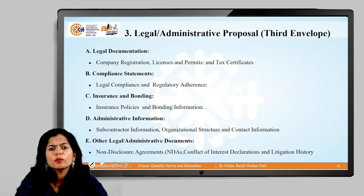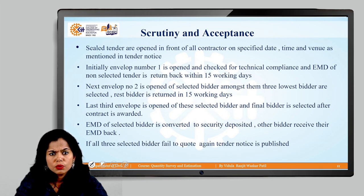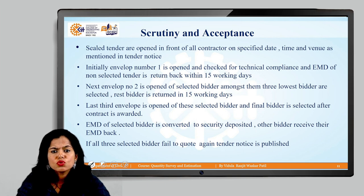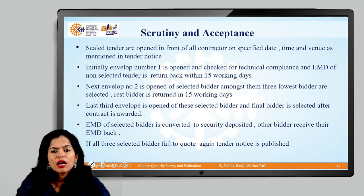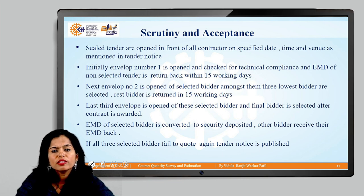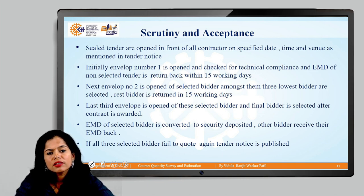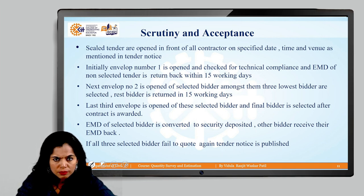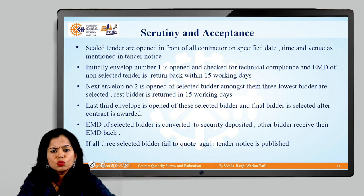The third envelope is only opened for the selected contractor. In the scrutiny process, a sealed tender is opened in front of all contractors on the specified date, time, and venue. Envelope one is opened first and checked for technical compliance and EMD. Non-selected contractors get their EMD back within 15 working days. The second envelope of compliant contractors is then opened to find the bid cost.